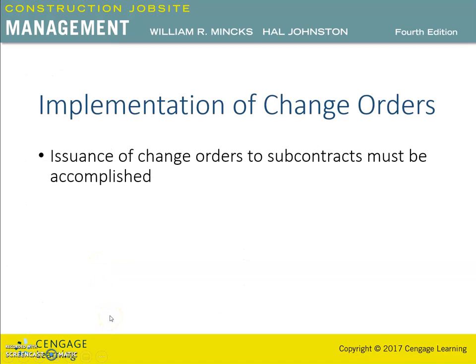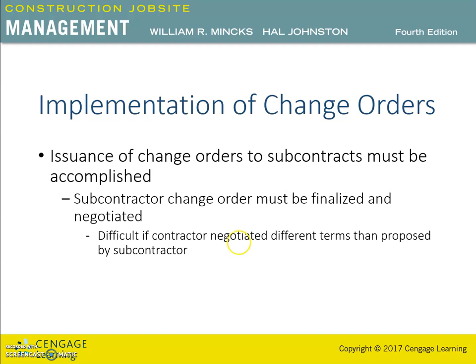Next, we will be talking about the implementation of change orders, and then we will be talking about the summary. For the implementation, the contractor's project team has not completed their work even after receiving a signed change order. Issuance of the change order to the subcontractors affected must be accomplished. Many times the actual subcontractor change order still must be finalized and negotiated.